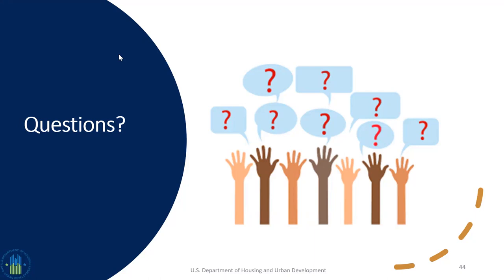And just to add, I think this is consistent with, or possibly answers some of the other questions. Legally, a property could convert as soon as the next day after a property reaches DOFA. But the only way to do that is if the PHA makes sure it's updated its financing plan to make sure that's final, as needed, but also has submitted its closing package to us, which can happen before construction is fully completed. There's nothing preventing that. We haven't yet seen it done, as Stacy said, but it certainly is possible if a PHA is sufficiently motivated and has its ducks in a row to put its closing package together for the conversion to happen very shortly after the property hits its DOFA date.